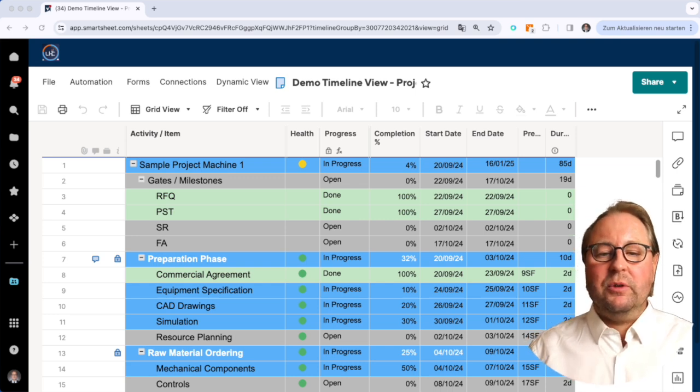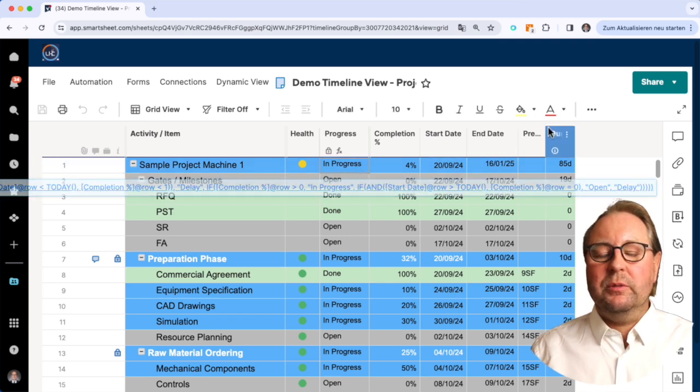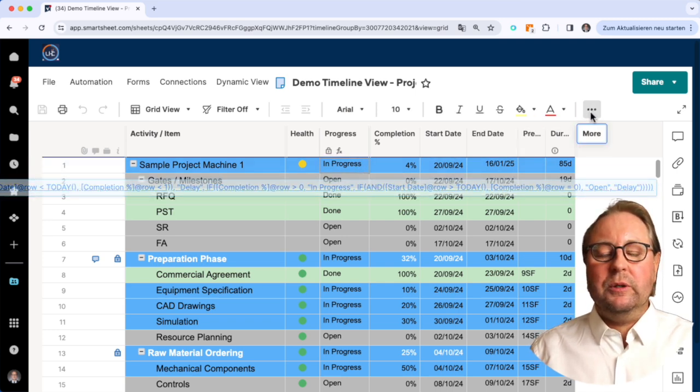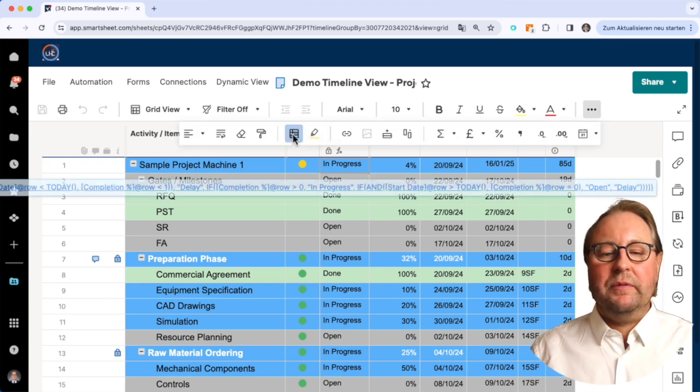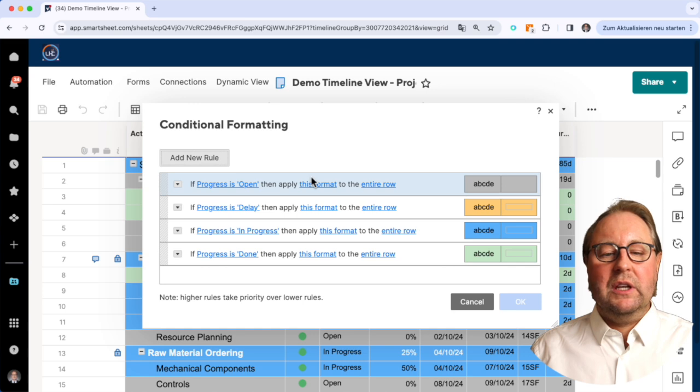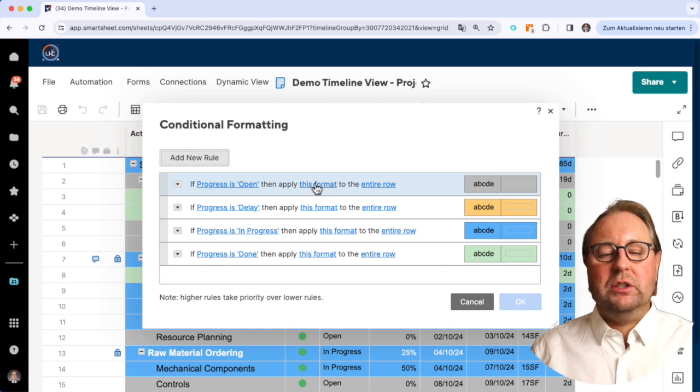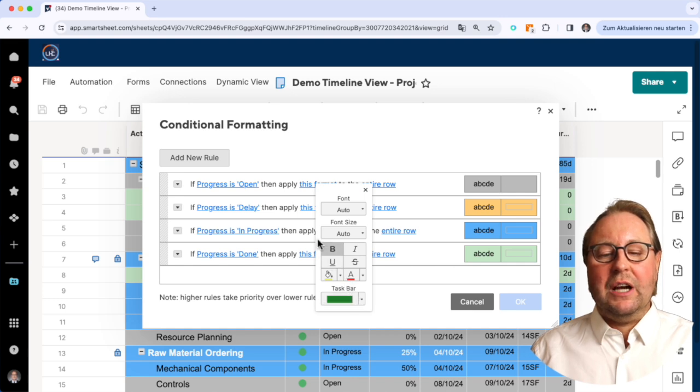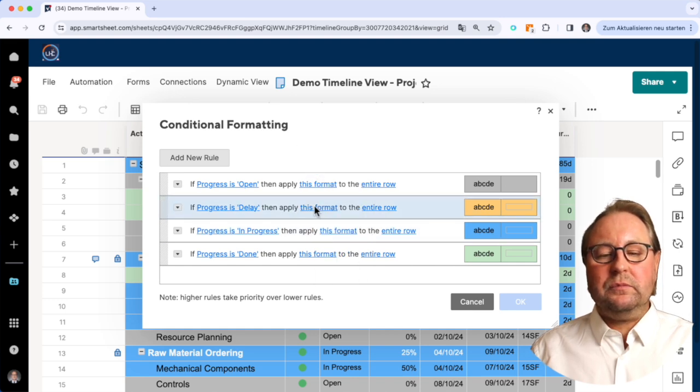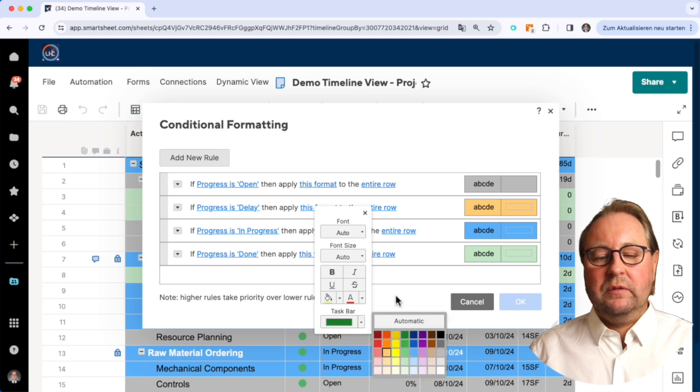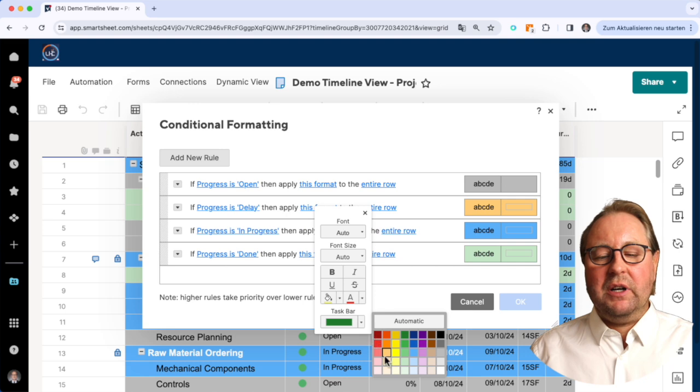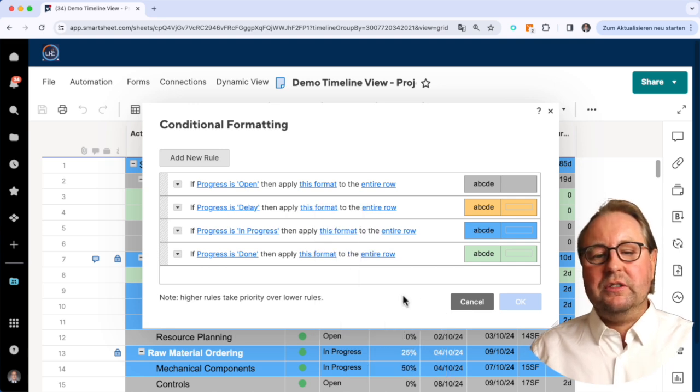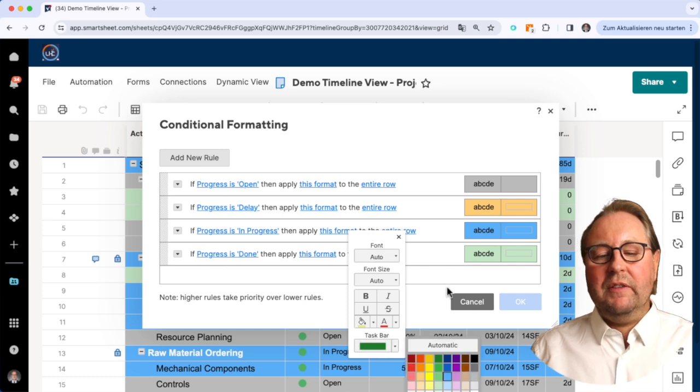The first thing is we need to utilize the conditional formatting. You can see here in the progress there's a formula behind, but furthermore each status of a progress is also coloring the taskbar, and that's very important. For delay, the taskbar is orange, and then of course the same color will appear within the timeline view.